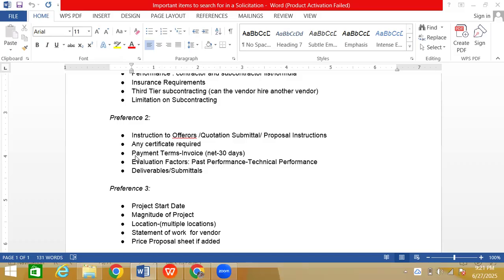So if they're asking for a deposit, like a 50% deposit, we are not going to do that. There's a reason why. Because we are not getting paid unless the government pays us, right? So what if we give the vendor 50% payment and they do not do the work correctly or properly and they have to drop the contract? That 50% is not going to come back because deposits are non-refundable. That is the problem. We're not going to take a risk that can cost us.